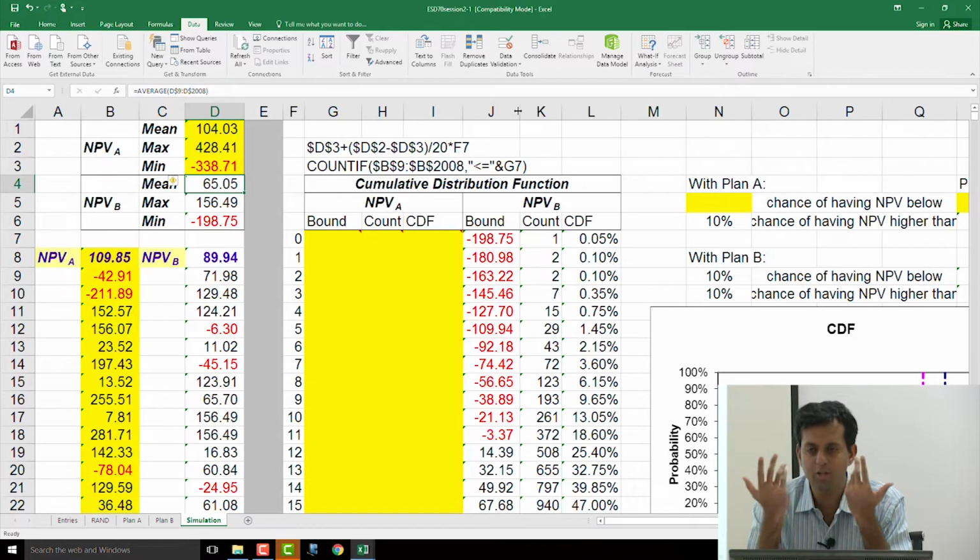That is based on how you decide uncertainty: you have to do some kind of analysis to figure out what kind of distribution you are seeing in the sample, what distribution it fits, what the mean of that distribution is, and what the standard deviation is. The standard deviation or the variance is some measure of the uncertainty. Based on that, what do I put into the model? You have to do that data-driven analysis to understand where that 50% comes from.